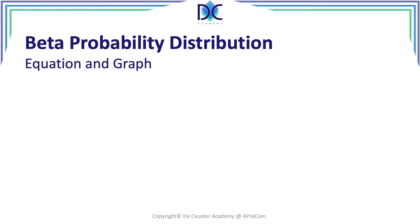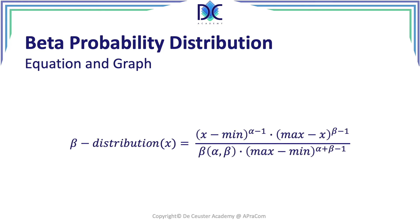There is also an equation and a graph for the beta distribution. You don't have to know this equation by heart. The beta probability distribution is available in Excel and is quite easy to use — you enter the minimum, the maximum, the x value, and the form factors alpha and beta.